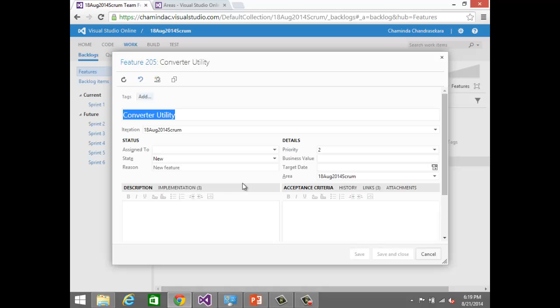There's something called stack rank. Now in this one it's called stack rank in one implementation, I'm not exactly sure, but there is about a 16-digit number automatically generated, which was available for us to edit in earlier TFSs. I mean 2012 update 4 also, you had that possibility to edit it. So people used that number to order the backlog, right? And the problem was when they accidentally dragged something from bottom to top, everything got randomly numbered again. Randomly numbered means in the particular order it will randomly give a number.